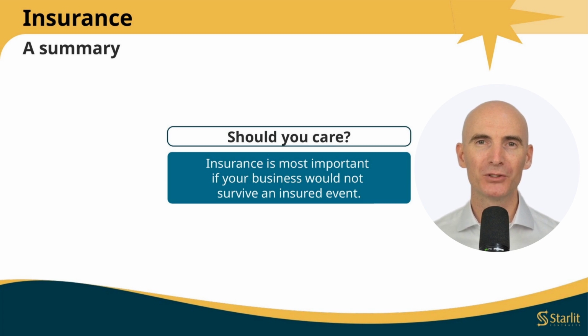And here's why it matters. If there's a fire, a design failure, or a serious accident, and the clause doesn't match the insurance policy, then you might end up holding the bill. Having insurance in place and making sure that the allocation of risk between the parties is properly addressed can make the difference between survival and bankruptcy if something goes seriously wrong.